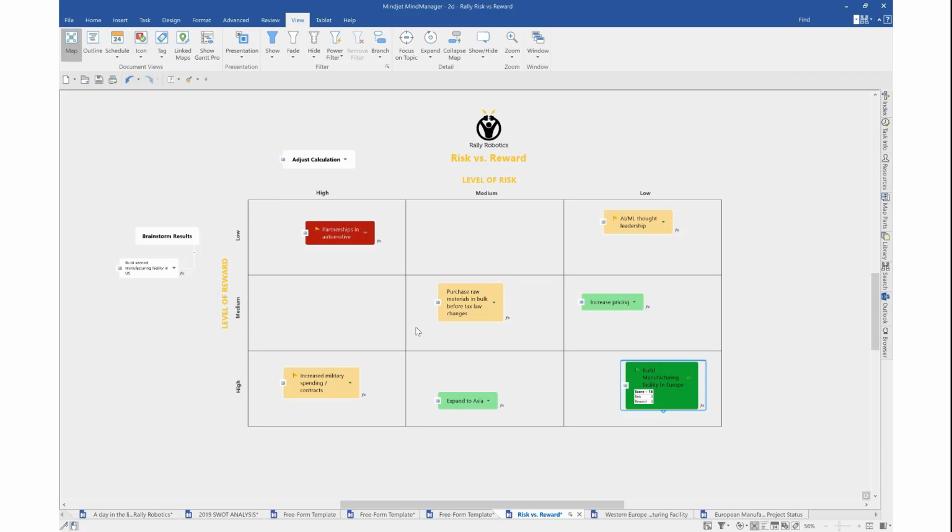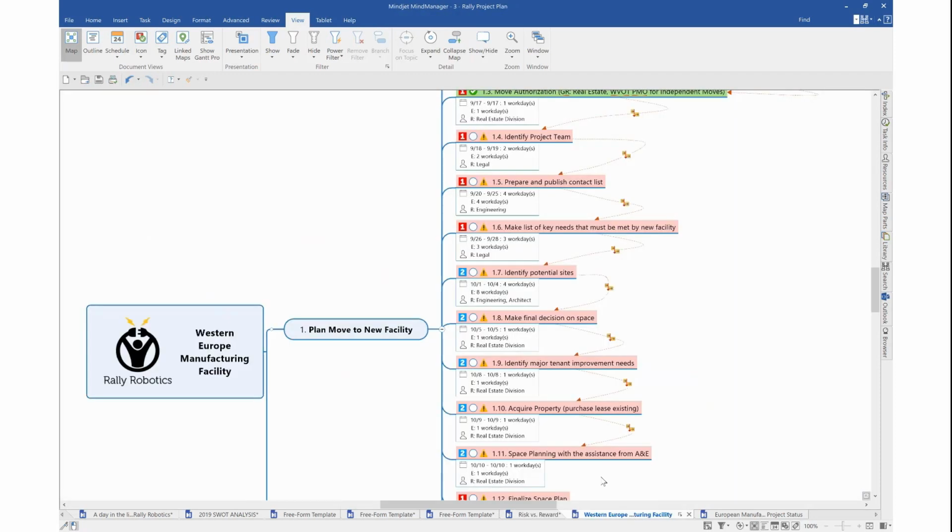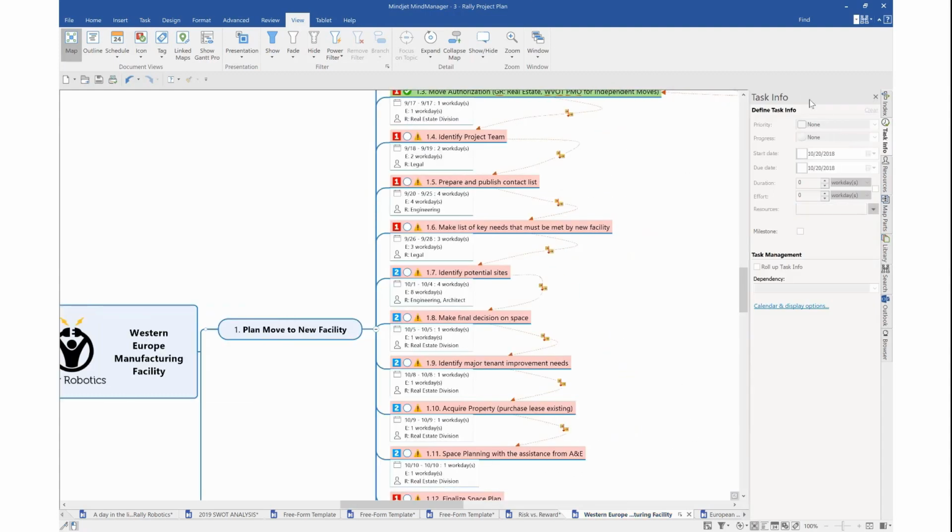Super powerful. Now moving forward, in the example is some updates that we've added to the project planning. In this release, we've enabled effort-based planning. So if I take a topic, I'm going to talk through this really quickly. I'll open up the task information. In this example here, we have one task with one resource that's going to take 2 days, and it calculates as 2 days of effort.